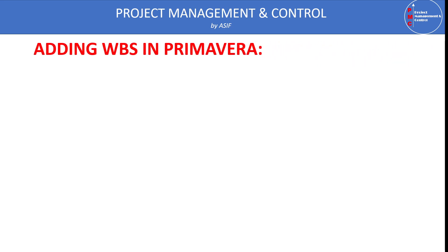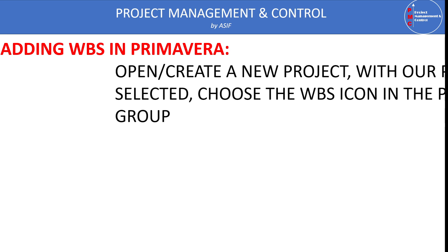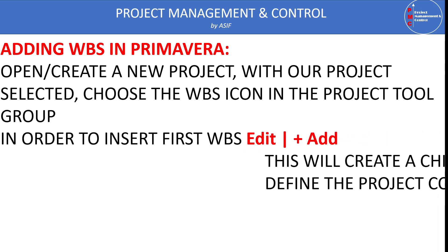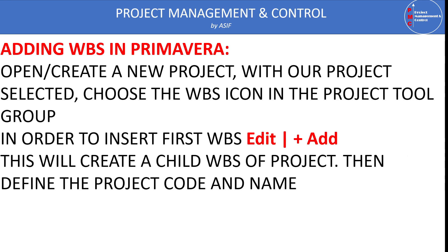Now we will see how we can add a WBS in Primavera P6. To add a WBS in Primavera P6, either we open an old project or create a new project. With the project selected, we choose the WBS icon in the project tool group. Primavera P6 offers four or five types of windows: the activity window, the project window, and the WBS window. I have already made a separate video for different layouts in Primavera P6 — please visit my channel and find that video.